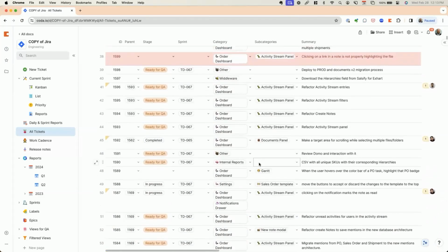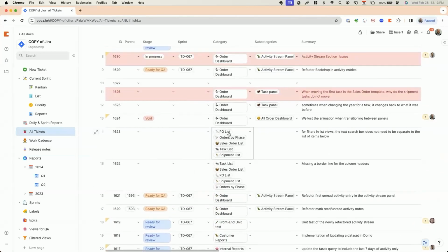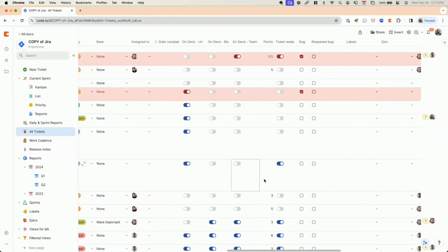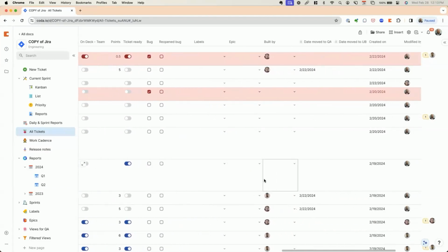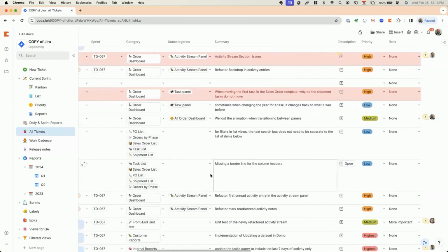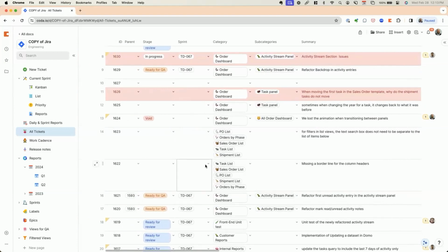And the same thing for categories. So this ticket up here that we saw that has 4 categories, however many points that is, I don't know where the points column is here, however many points that is, just divide it evenly among all the 4 categories. So that at the end of the year, I can say we completed 6,000 points. How did we spend our time? On what areas of the application did we invest our time?